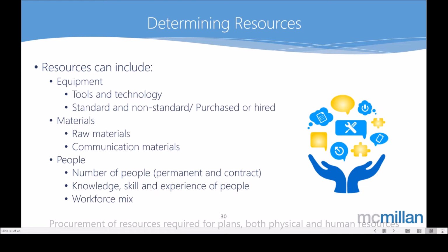However, if you decide that you need a piece of equipment that's non-standard, that then has a total impact. As your plan, you'd have to include extra steps of putting forth the proposal, getting it approved, allowing for getting the quotes, allowing for the approval of the quotes, allowing for delivery, and all that's going to have an impact on your final outcome, your goal. So that would then lead on to things on whether you purchase or you hire and so forth.